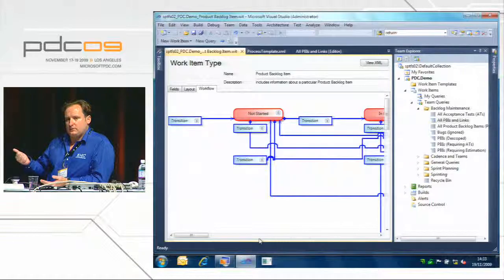One of the things we're encouraging people to do with the ROI field is once you sort it by ROI, start the conversation there, because you might want to move stuff around and drag and drop in Excel. But again, the business has got to have some pretty good reasons for wanting to build something that's got a really, really low ROI when you've got all these other bits and pieces, which is one of the reasons we put it in as a default field.